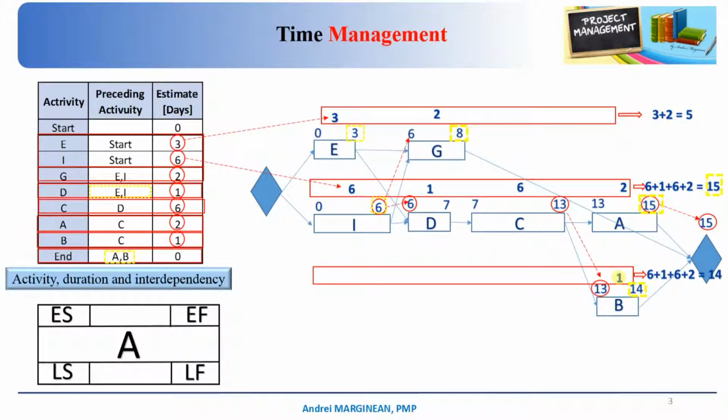Why is this called the critical path? The critical path cannot be delayed. Any activity on the critical path that is delayed will harm the project end time. We should pay a very big attention to the critical path activities. So we should focus on the critical path activities always when we manage our project. In that case, we are coloring the critical path into red just to make sure that we know this.